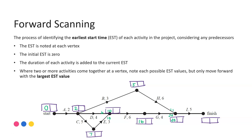We have to wait for both of them to be finished. The overall completion time: 20 plus five for activity I gives me 25. At this point my forward scan is all that is required to identify that overall completion time - the project will finish in 25 hours. The key thing is where two or more activities come into one vertex: we consider both options but only move forward with the largest of those earliest start time values.